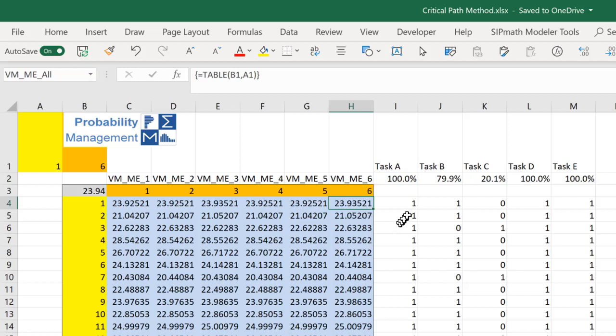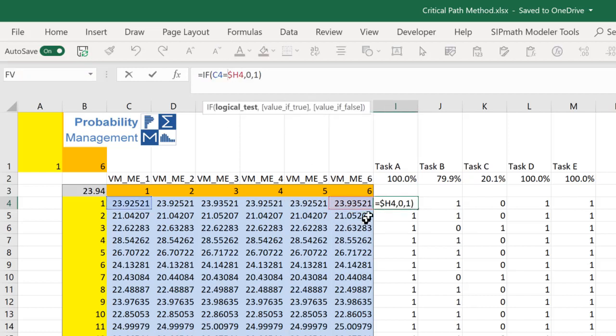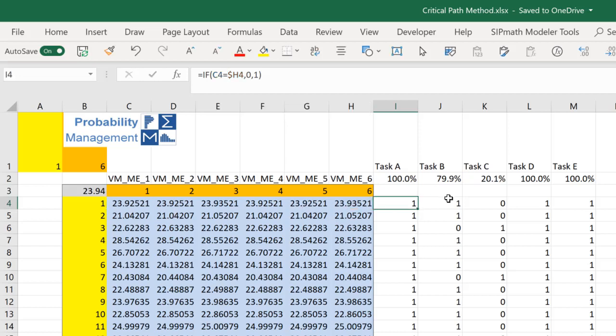Therefore, we can take the difference between this base value and the value with the epsilon. This gives us a table saying for each one of these 10,000 simulations, which of these tasks is on the critical path.